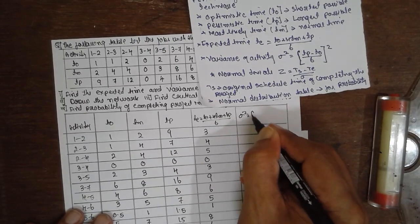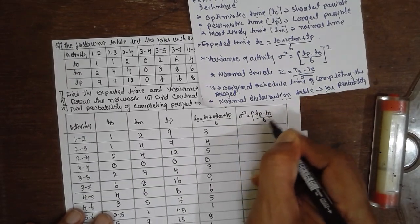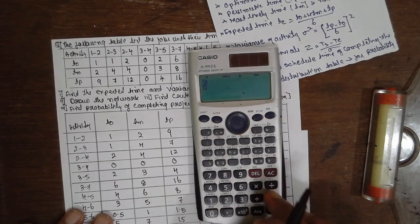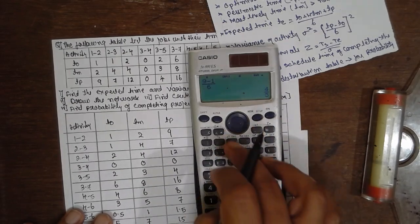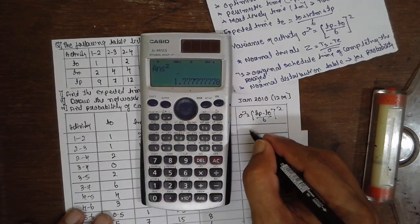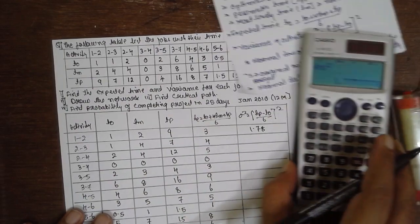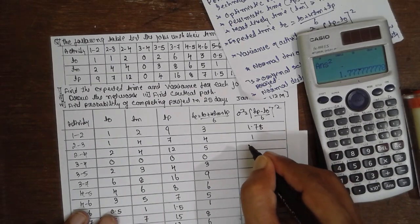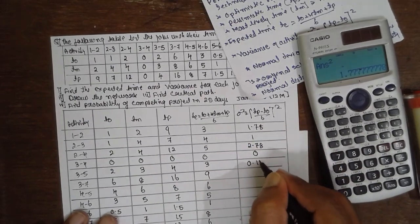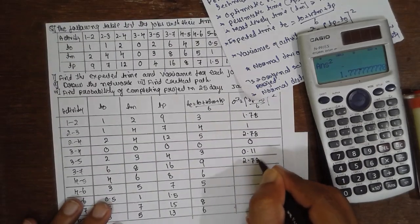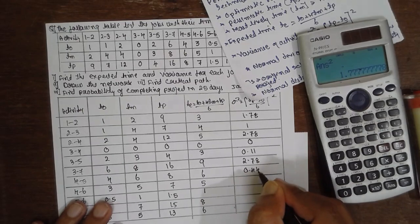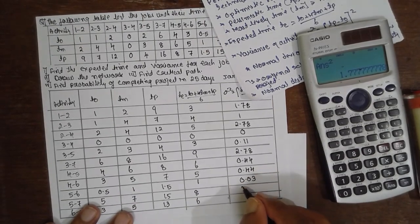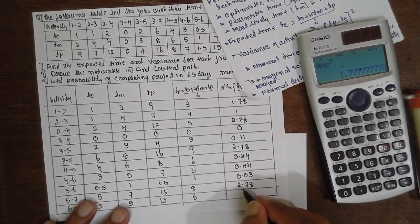Now find the variance. Sigma square equals TP minus T0 divided by 6 whole square. What is TP? TP is 9. 9 minus 1 divided by 6 whole square. This value is 1.78. Don't go for square here, just write the value. Follow the same procedure: 1, 2.78, 0, 0.11, 2.78, 0.44, 0.44, 0.03, 2.78, 2.78.